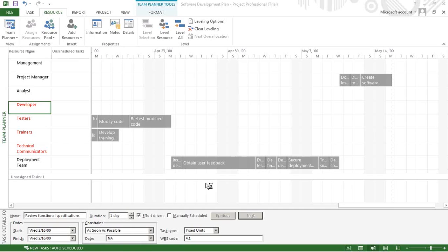So essentially we assume that resources are available. One developer getting allocated for 16 hours in a day can happen because of the complex network diagram that we get over the period of time. If the project is of 2 years or 3 years, there is a likely chance, even for a small duration project, I have seen over allocation, because you have limited resources and so on. So Balchandran, this is how we get the indication automatically that the developer is over allocated, the tester is over allocated.